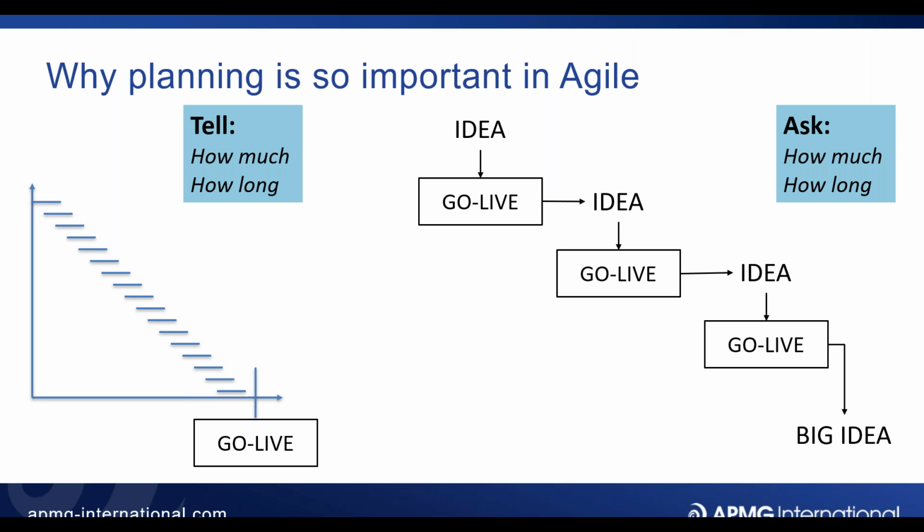Okay, so if I want to bring together a proposal of what that work's going to involve, what I need to do is go and say to the business, how valuable do you think this idea is? How much extra revenue do you think it will bring in? How much cost do you think it will save? And really make them think about the business value of that particular idea. And then you say, well, what are we going to spend? 30% of that anticipated revenue on actually making it happen? 25%? So in other words, you have to go to a completely different set of questions, which is start with the total business value. What do you think you're going to get out of it? And then agree what proportion of that business value do we want to spend on making it a reality? And that's where your constraint comes in.